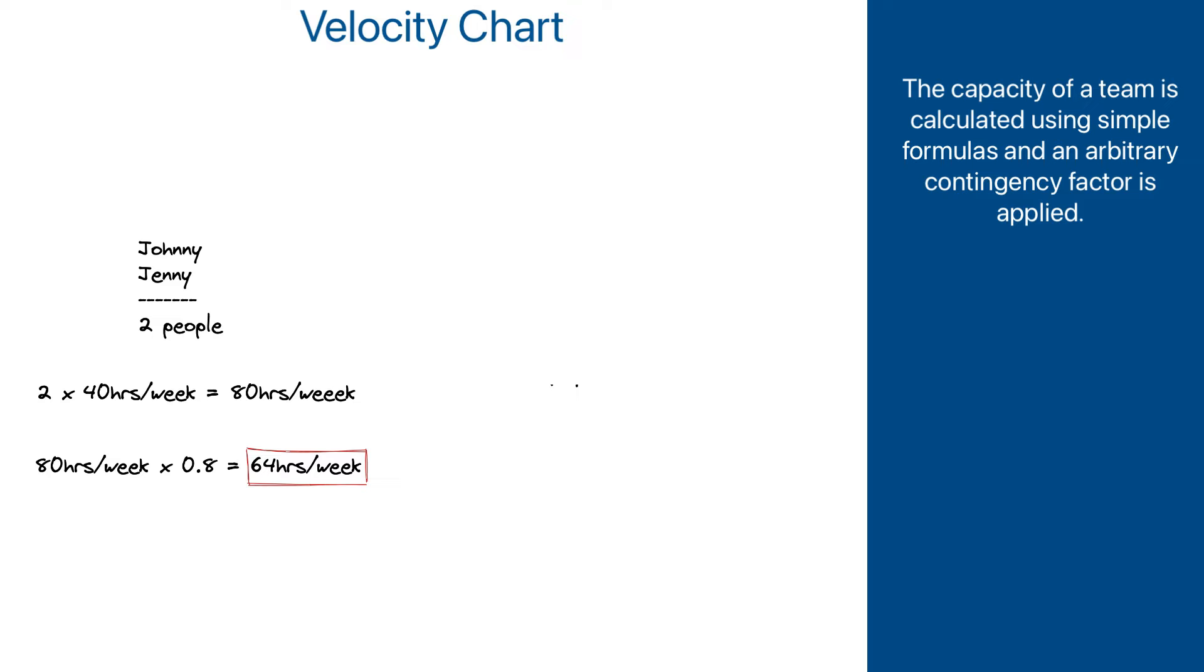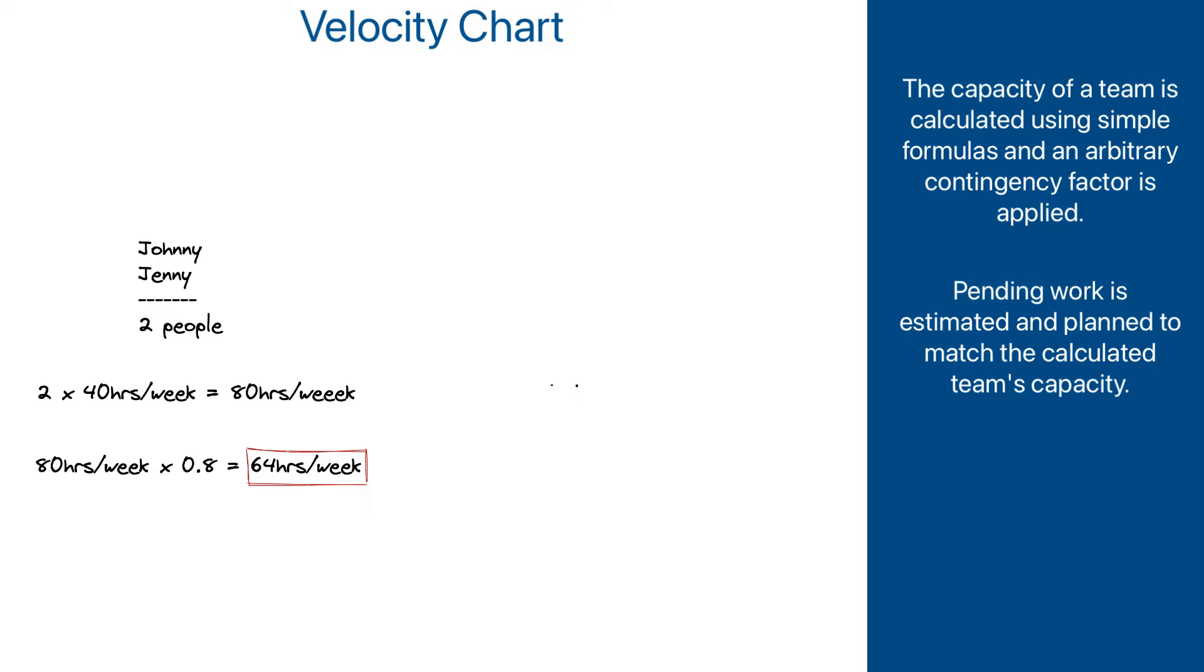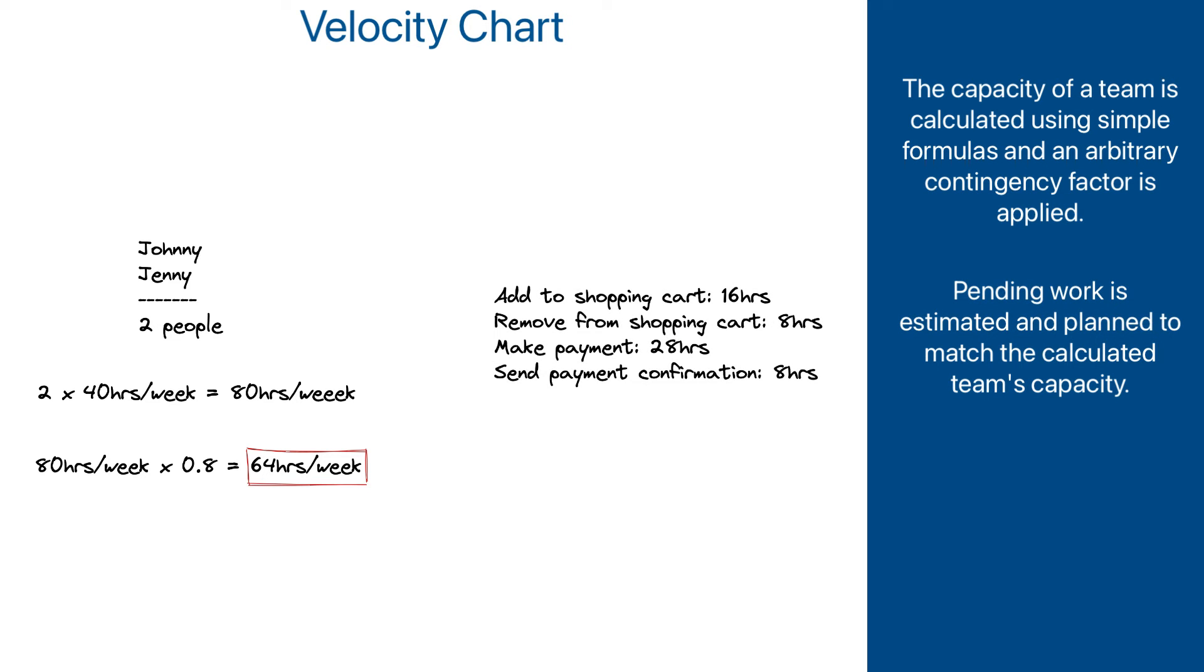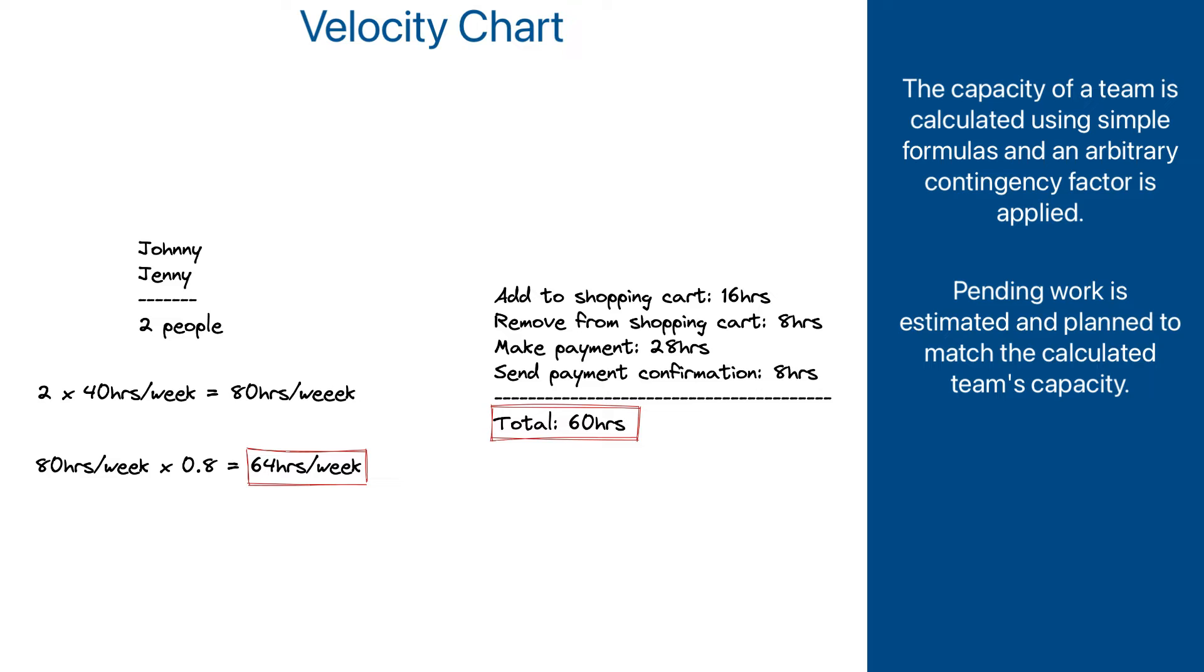At the same time, work that needs to be done is estimated in hours, and then individual pieces of work are planned for each week and assigned to team members, while paying attention that the total planned work does not require more hours than the calculated number of hours the team can do.